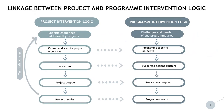On this visualization, you see on the left-hand side the project intervention logic and on the right-hand side the program intervention logic. There needs to be a very clear linkage and consistency between the project and the program intervention logic. For example, the overall and the project specific objectives need to clearly contribute to the program specific objective. The project activities need to be consistent with the supported actions as foreseen in the program document. The project outputs need to contribute to the program outputs, and the project results need to be consistent with and contribute to the program results.